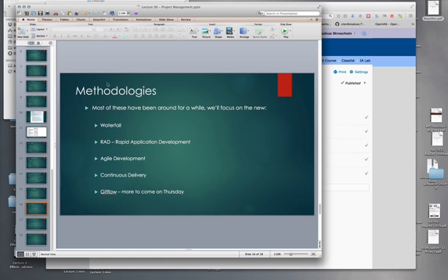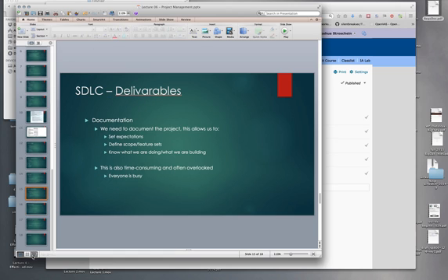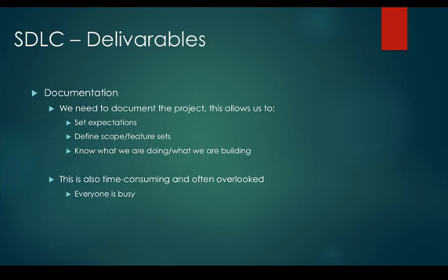All right, last thing I want to say here is just the overall deliverables, the documentation. It needs to be done. It's hard, it's time consuming, it seems relatively unimportant, but it does have a very big impact. Again, this depends if you're small or large, but even as a single-man shop, I often create a fair amount of documentation for every contract I go into, because the documentation allows me to document my expectations and the client's expectations. It helps me define and have in writing the scope of my project, what I'm going to work on, what I'm not going to work on, and how long I think it'll take.